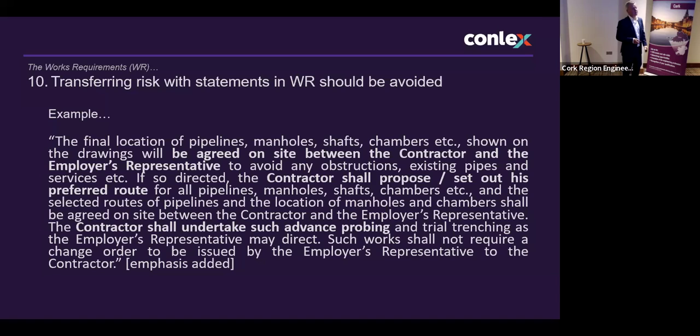If so directed, the contractor should set out his preferred route for all pipelines, even though the contractor is not the designer, and the selected routes of pipelines and the location of manholes and chambers should be agreed on site between the contractor and the ER. The contractor should do site investigation, basically trying to figure out where everything should go. And he should not require a change order to be issued by the employer's representative.